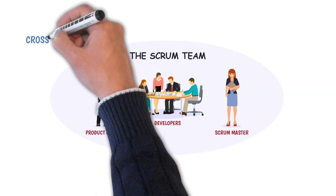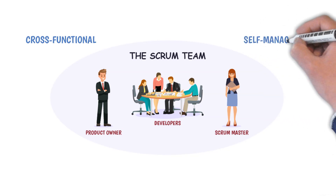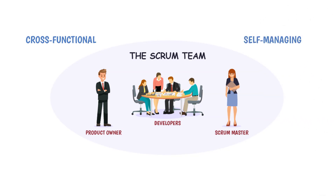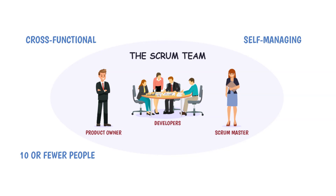Scrum teams are cross-functional, meaning the members have all the skills necessary to create value each sprint. They are also self-managing, meaning they internally decide who does what, when, and how. The Scrum team is small enough to remain nimble, and large enough to complete significant work within a sprint, typically 10 or fewer people.